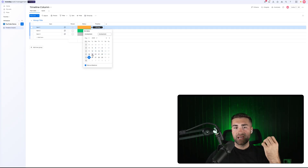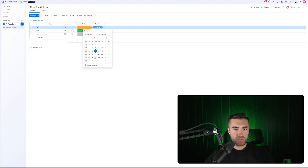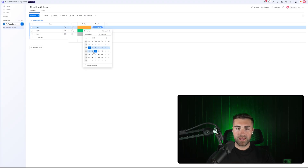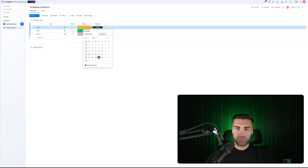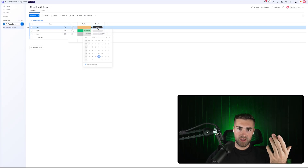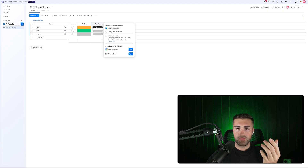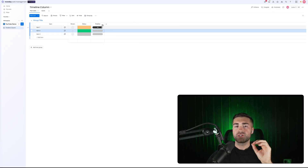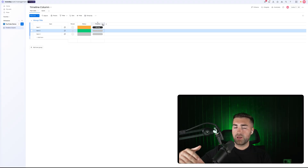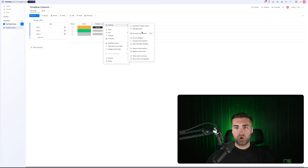The milestone setting completely changes how the timeline column works. Normally you have a start date and end date, but as a milestone you select just one date that represents an objective. In project management, you might have tasks spanning multiple days, but the milestone — indicated by a diamond shape — marks the date by which you want everything completed. You need to enable 'Show set as milestone' in the settings for this option to appear.